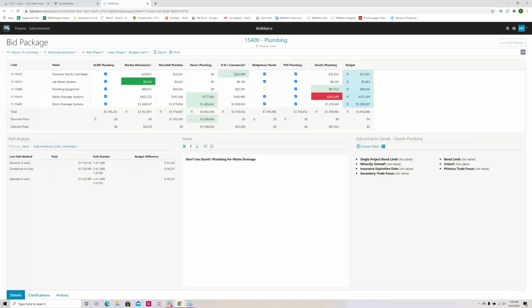It's Steve's Plumbing, B&L Commercial, and David's Plumbing. So the number one solution involves 3 subs. The conditional, right, might involve 4 subs. Okay, and as soon as he removes those conditions, I'm back to 1,606 possible solutions through this matrix.